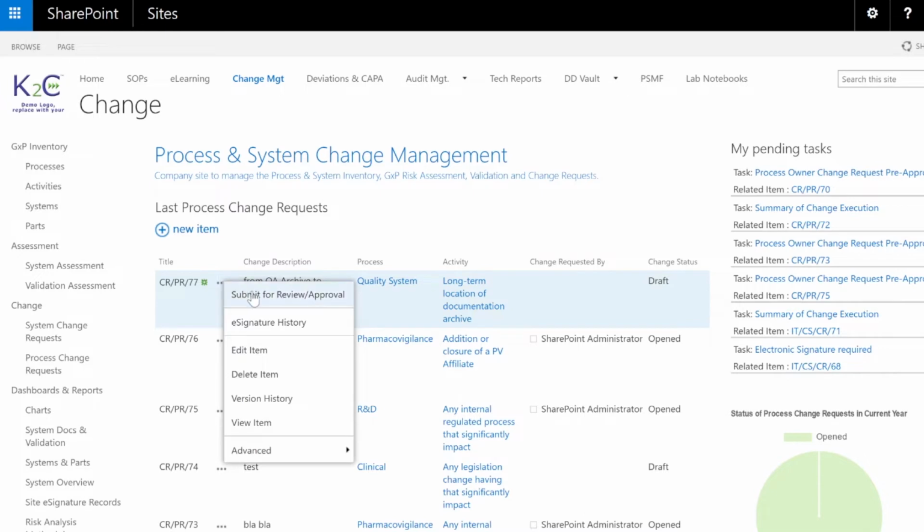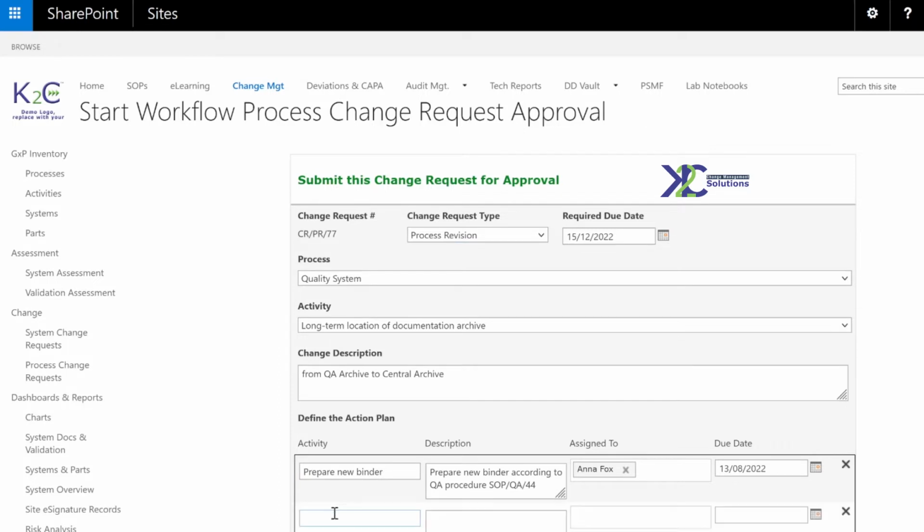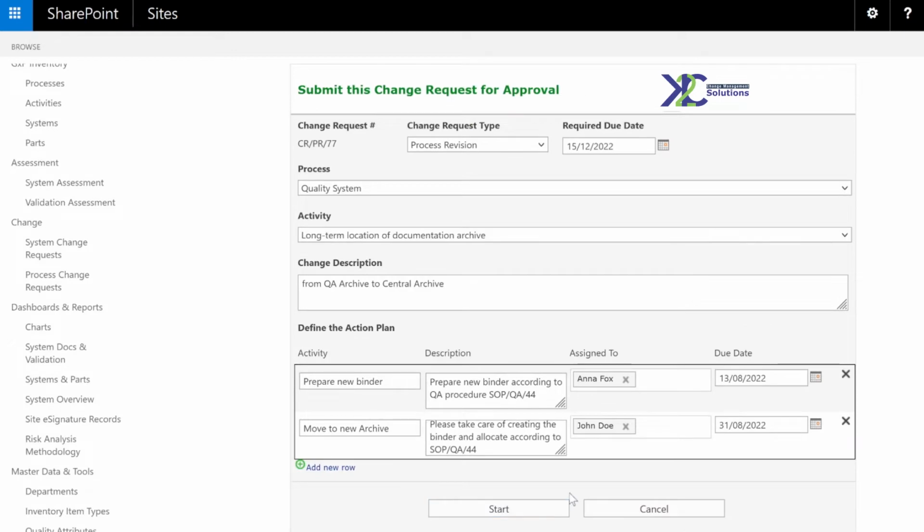When submitted for pre-approval or approval to authorize the implementation, a plan to implement the change request must be prepared. The implementation plan details any required activity, including also validation if required. Execution or control of execution of each activity is assigned to an employee.